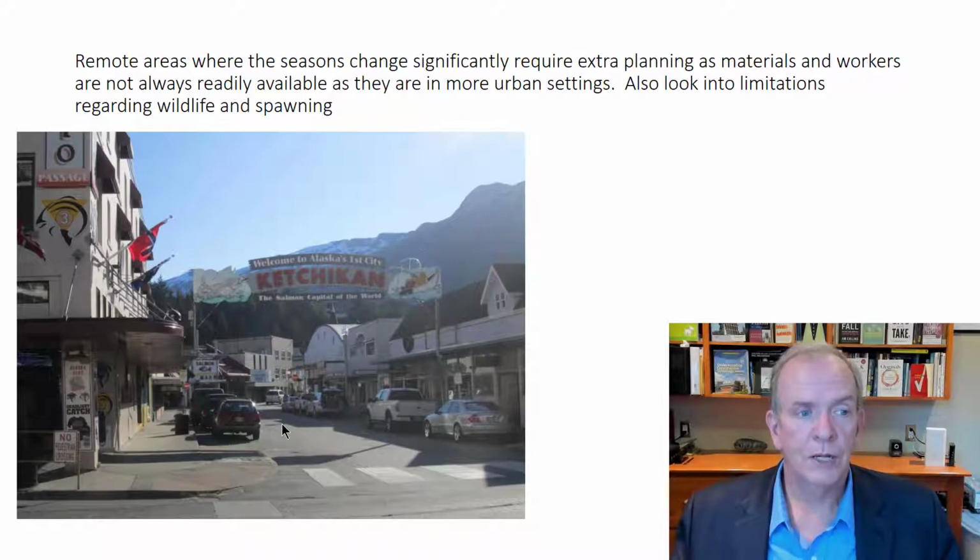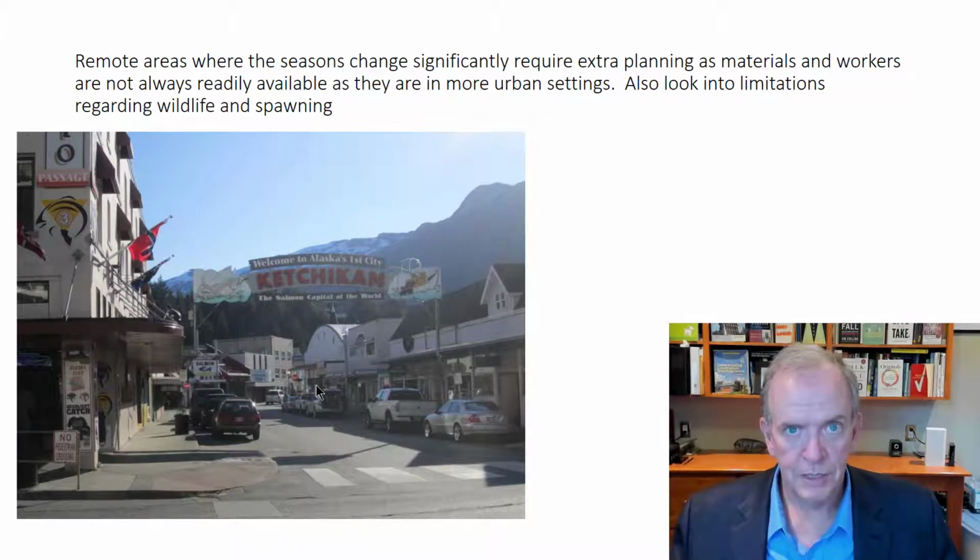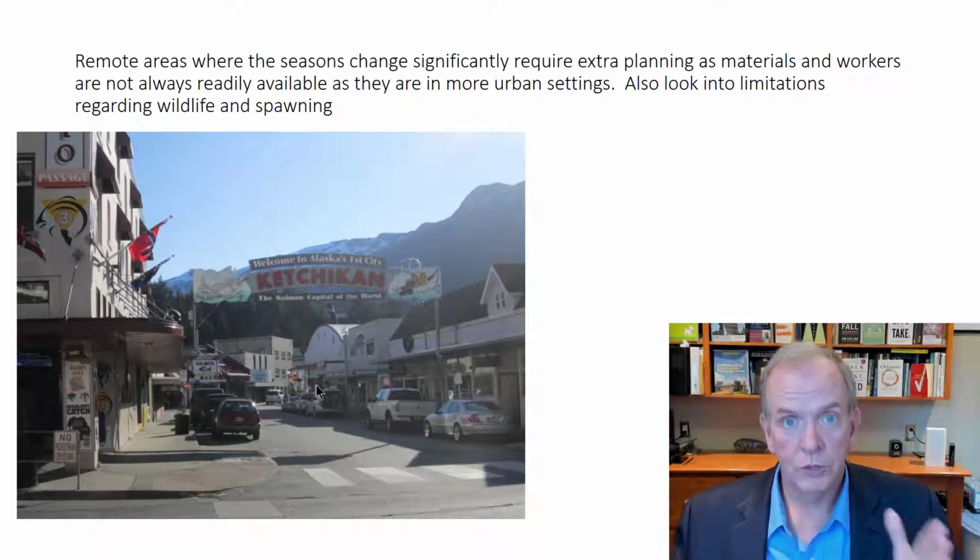Very remote areas are challenging because this is in Alaska. You can imagine it's pretty remote there, and it had no particular road that you could drive in on. You came in by boat, and so this particular area, you would have to do some planning if you're doing some construction, because it's not like, oh, there's Home Depot, we're going to go get this and this. You have to have your orders tight, your quantity takeoffs tight, so that you have the right material come.